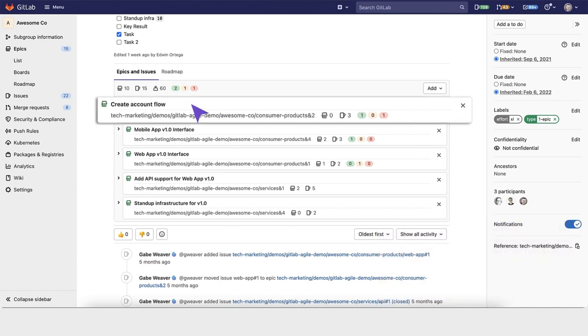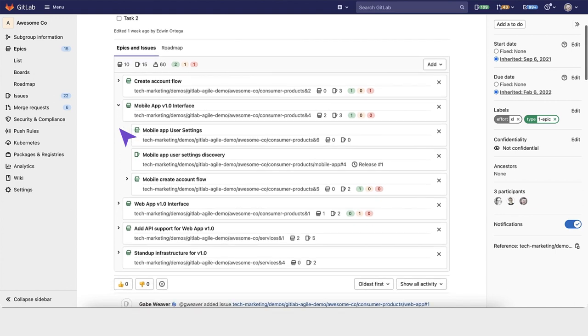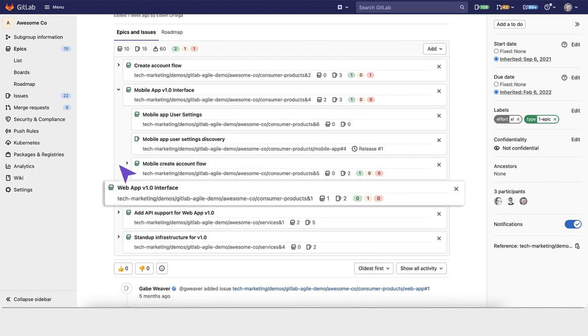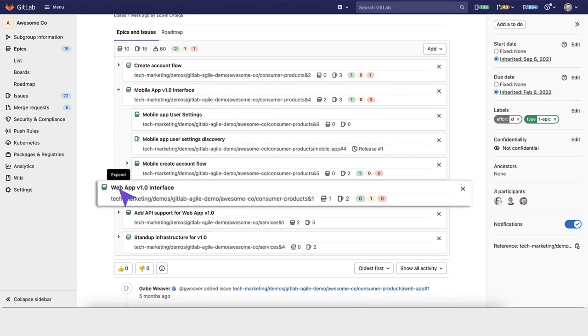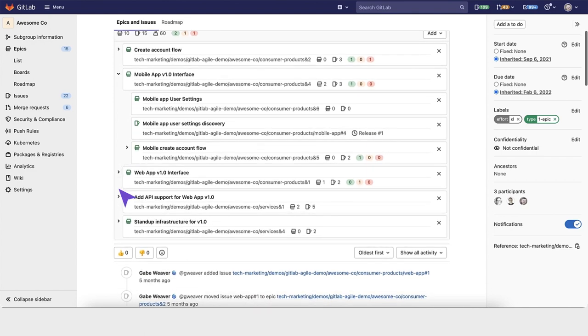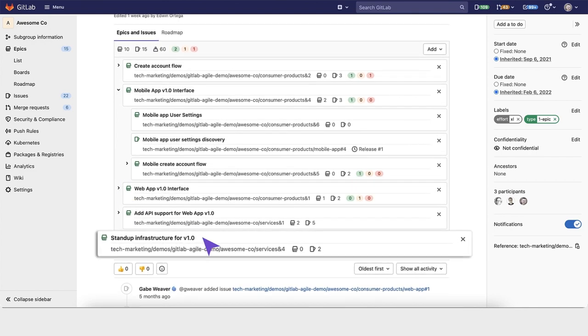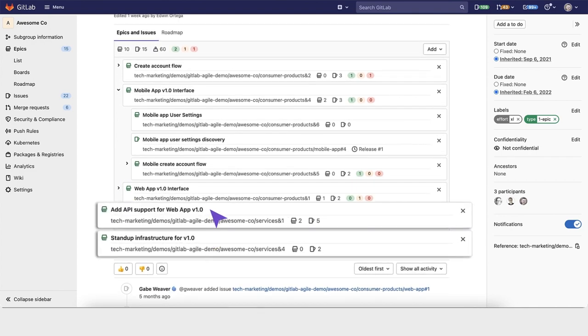An epic has been created here, as well as a mobile app interface within the consumer products team, a web app interface sub-epic, which is a capability within the consumer products group, as well as infrastructure and APIs that the service group needs to deliver.